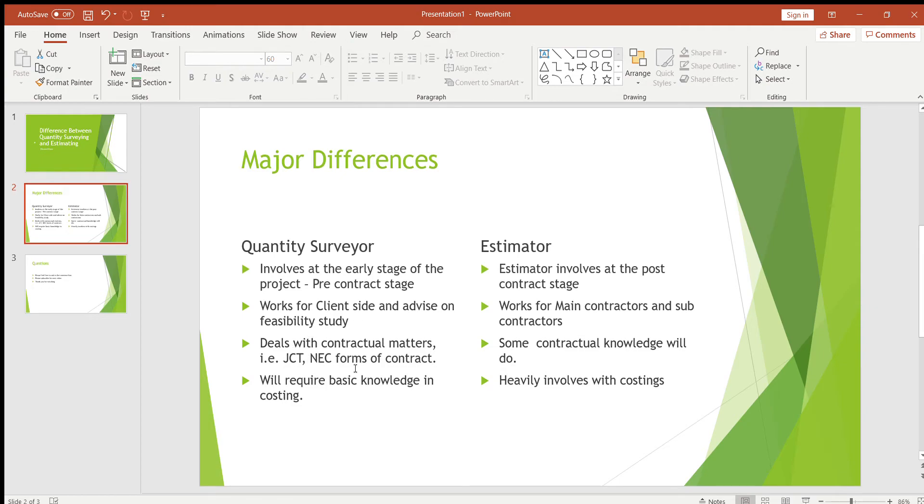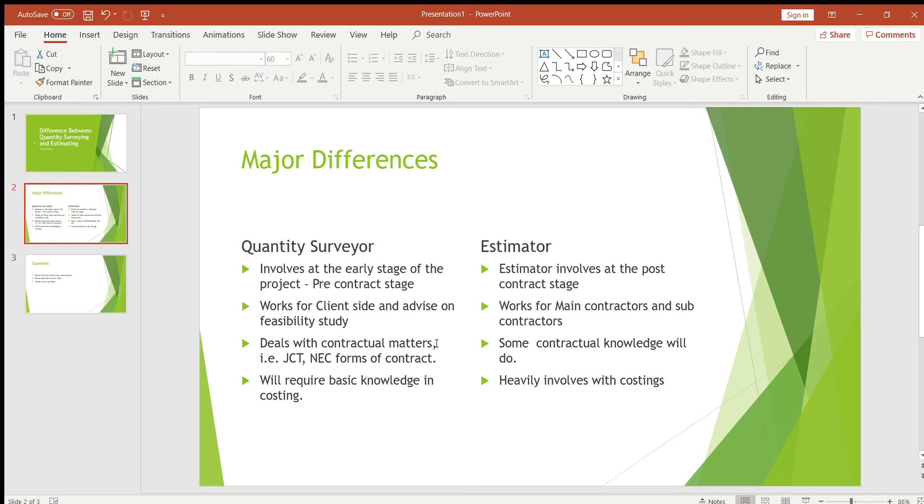The third one is a quantity surveyor deals with contractual matters, so he's going to advise the client what form to use, whether JCT or NEC forms of contract, and is going to compile all the legal terms and conditions.